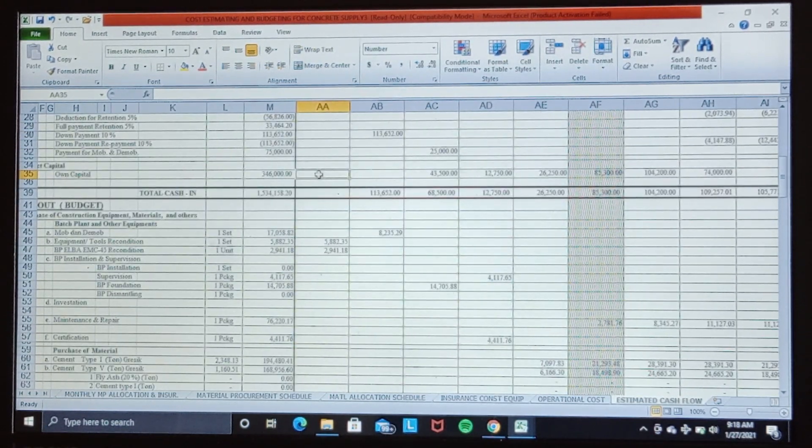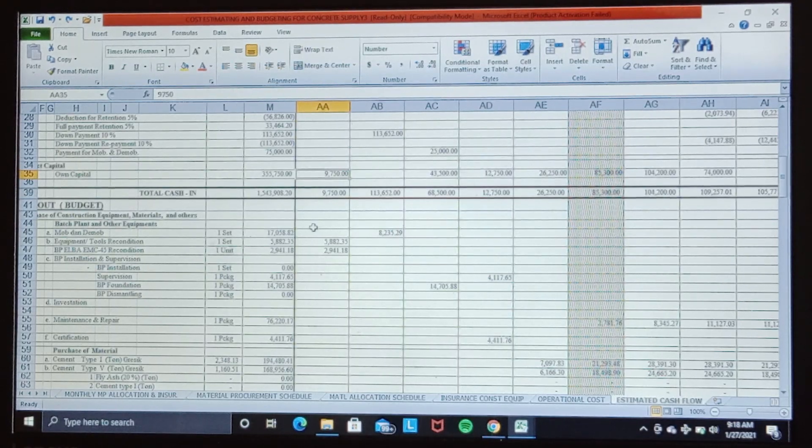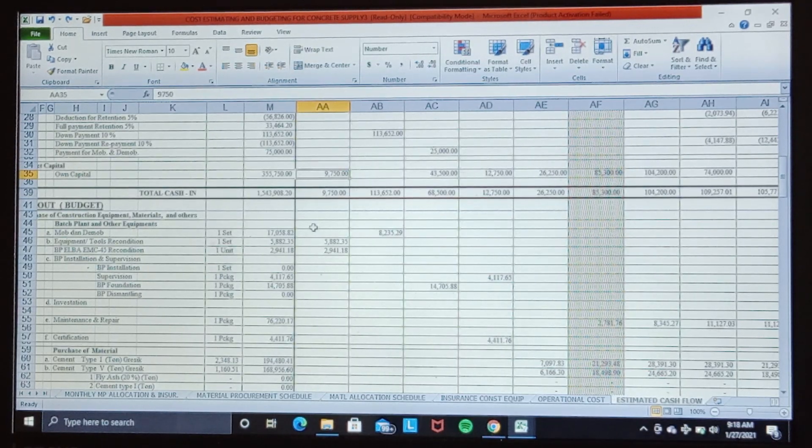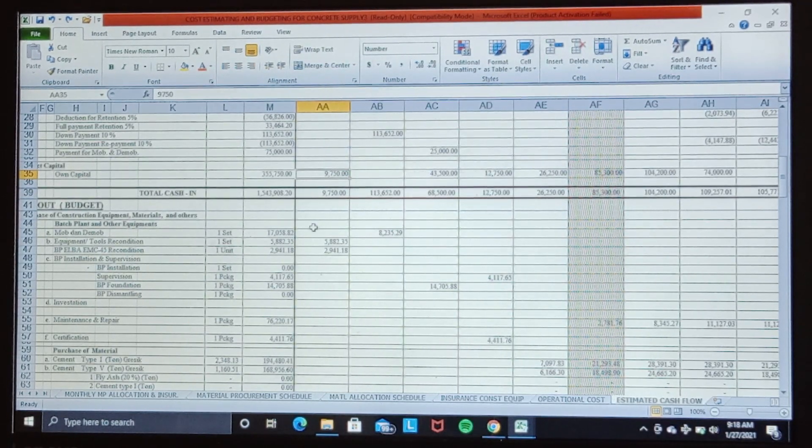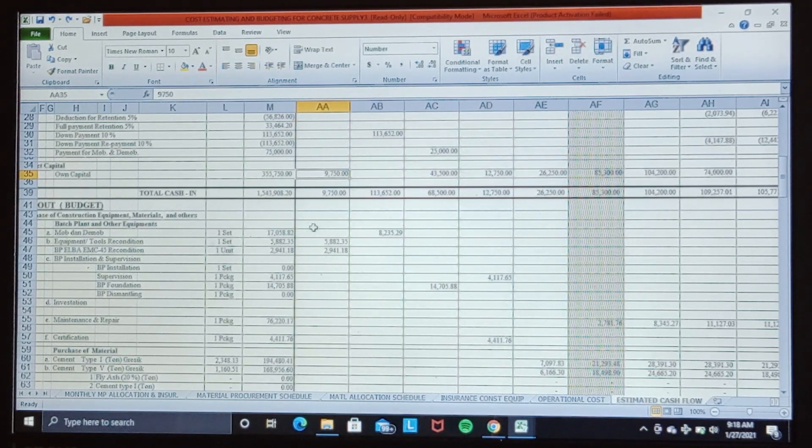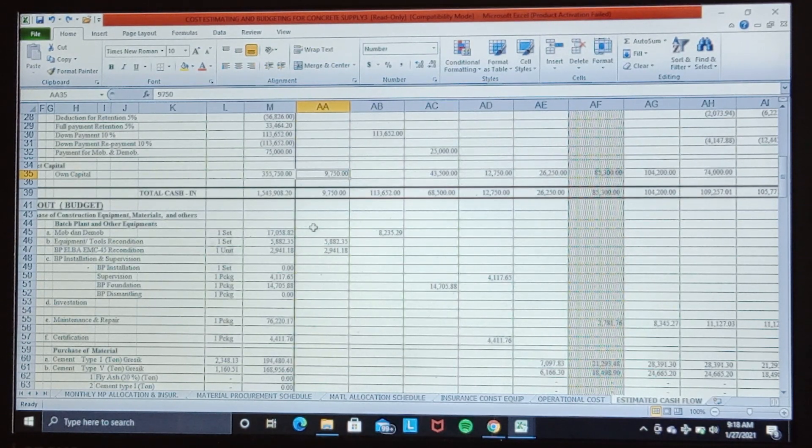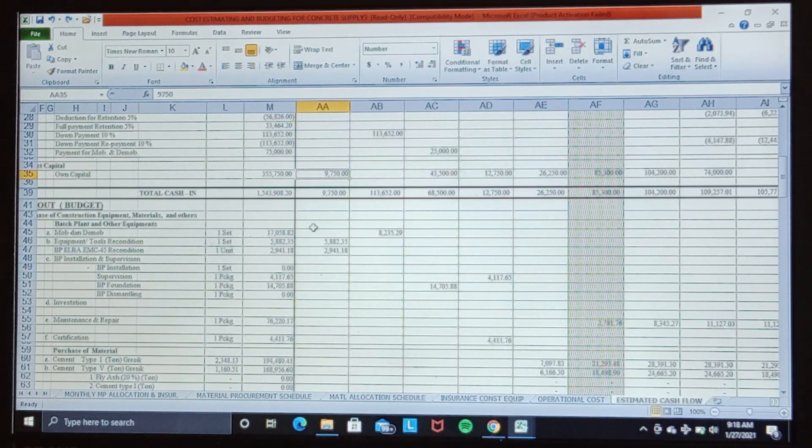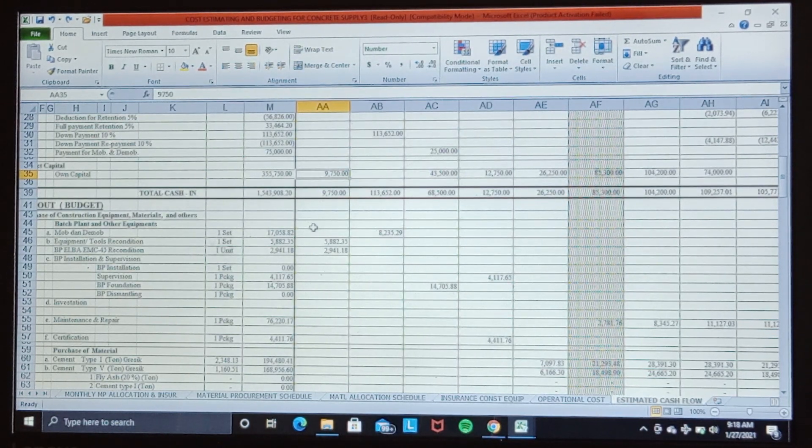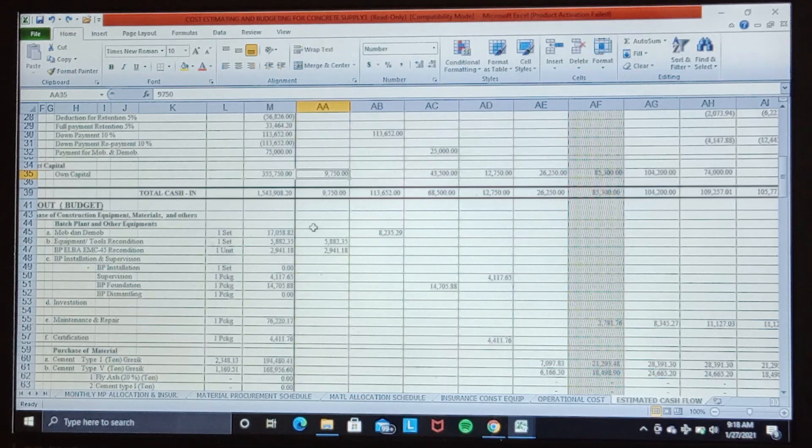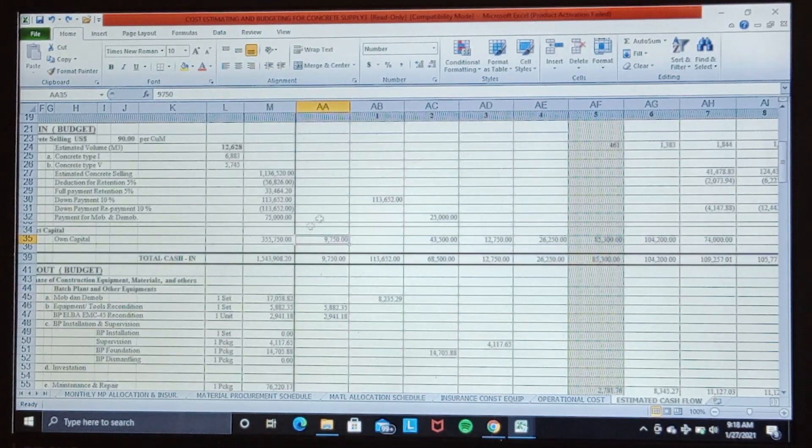We cover by our own capital of $9,750,000 because it is also for operational cost requirement in the early stage in the first three months before the progress invoice is paid by the client.